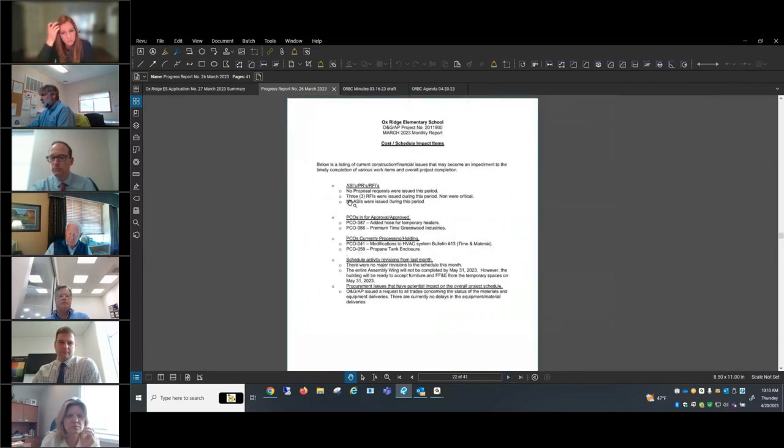This month, no proposal requests were issued this period. There were 3 RFIs, none were critical. No ASIs were issued this period. There were 2 PCOs that got approved and processed through the construction committee. And then there are 2 that are processing, holding.